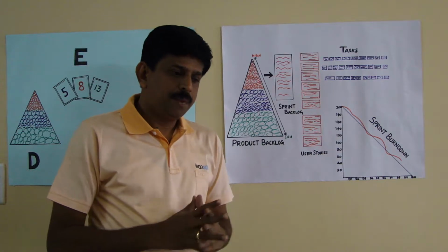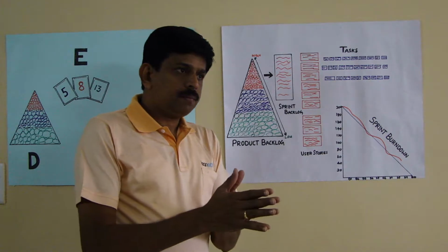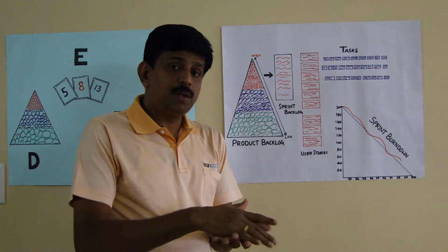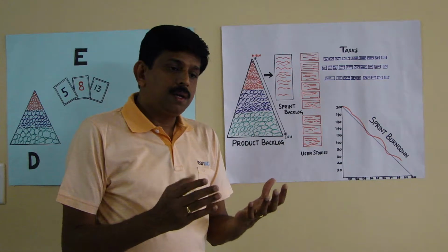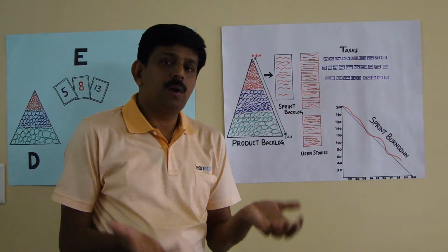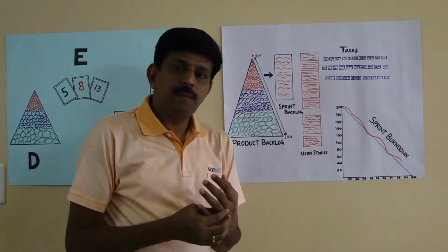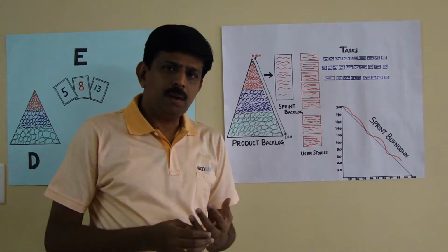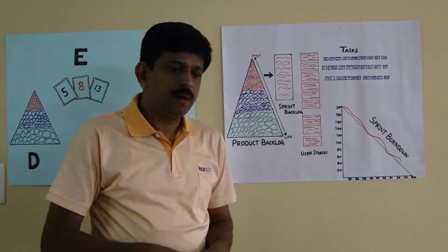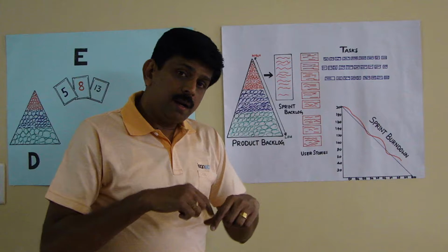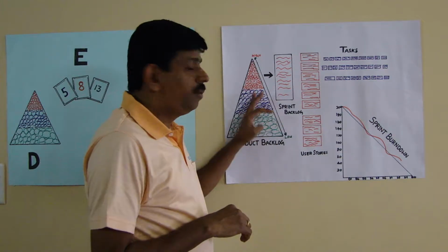The foundation is defined based on the original requirement. The foundation should be strong enough to hold a one floor house. We decided that it's going to take 19 columns, and each column is 3 feet deep. That we detailed very, very thoroughly.